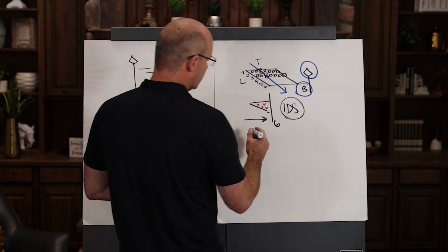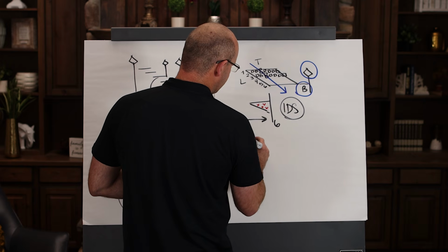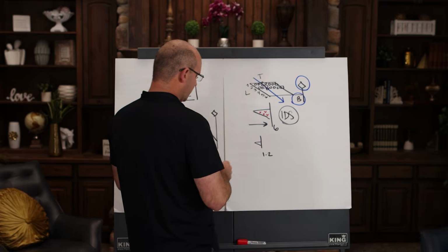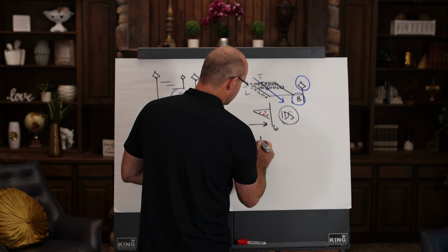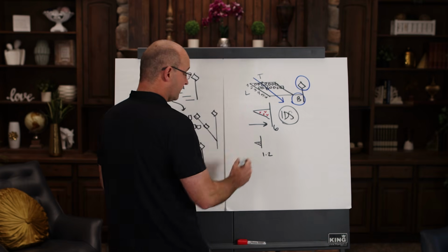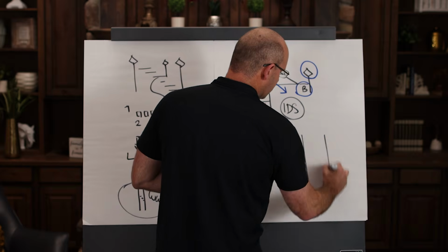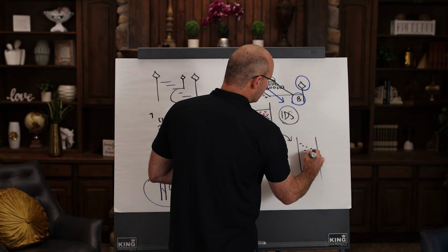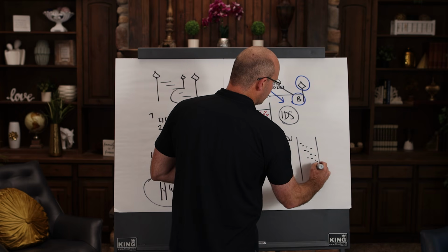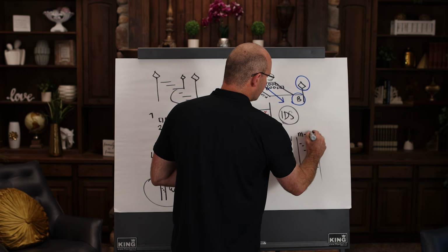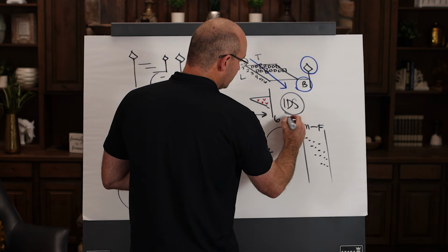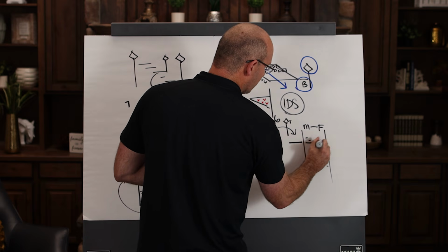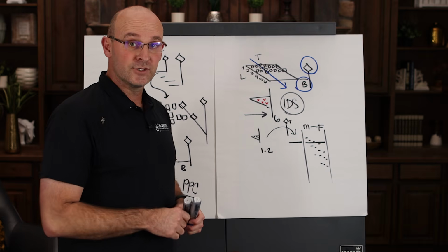And the way I visualize it is that we have to filter out a narrower, so 1 week out, I'd say 1 to 2 weeks out, we filter out the activities that are happening for next week inside the weekly work plan. Now this will typically, and I think it should all the time, break out the activities to where they're all on their own lines, and it will be Monday through Friday. And if you're doing this plan on a Tuesday, it will cover the rest of this week and all the way up to next week. And that is your weekly work plan.